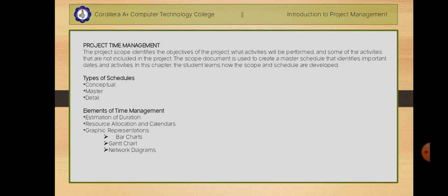On a small project, the project manager is responsible for accomplishing the planning function. After gathering all the information, the planner begins developing the project's master schedule, a summary-level schedule that encompasses the entire project scope, includes the major events, and provides a view of the entire project.